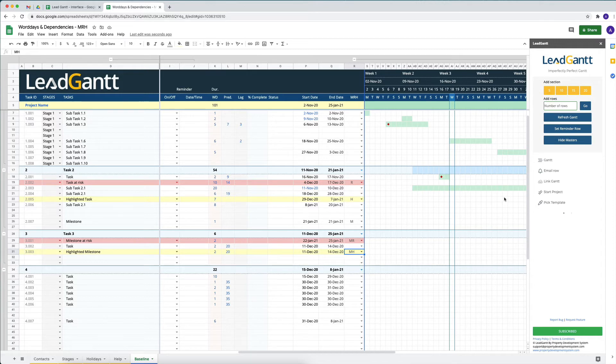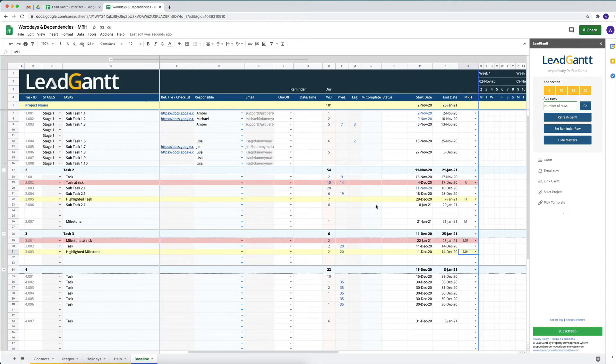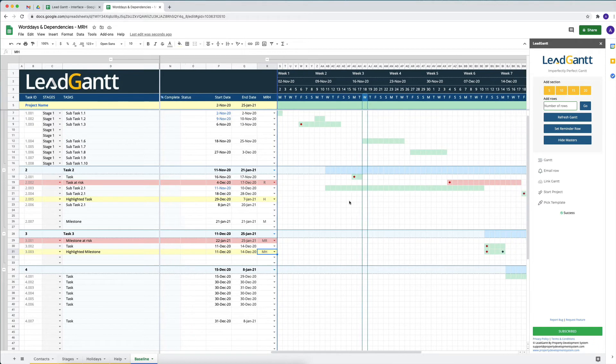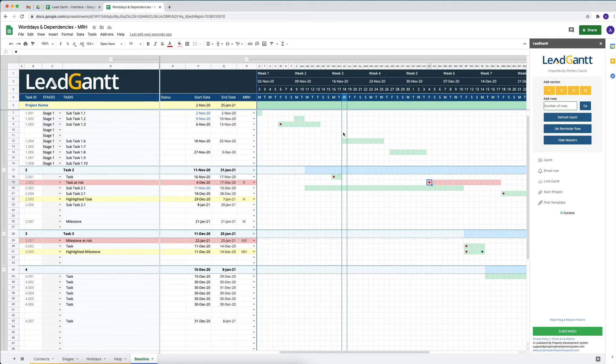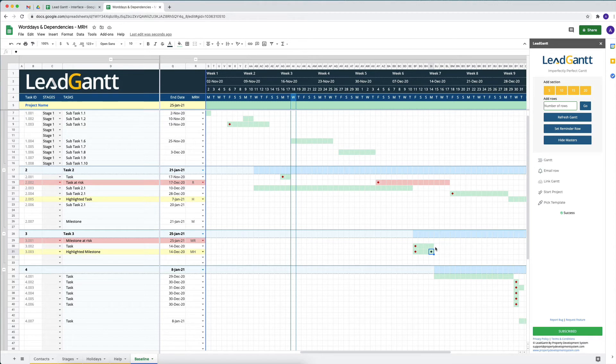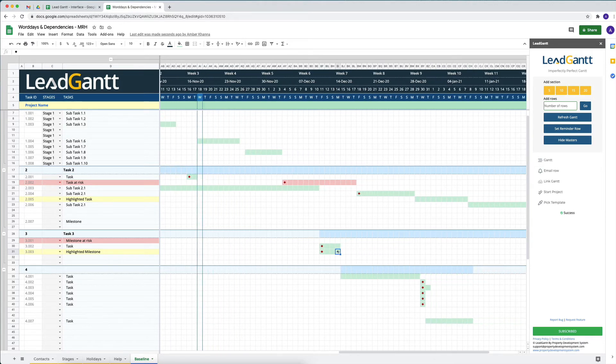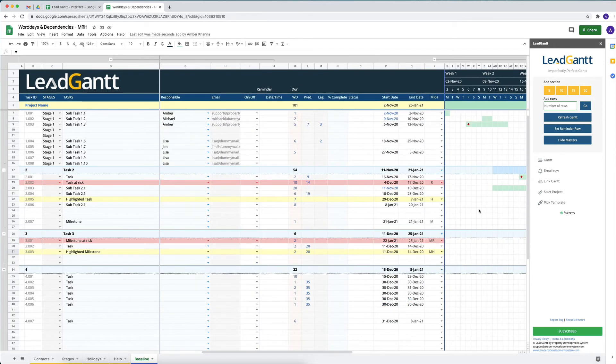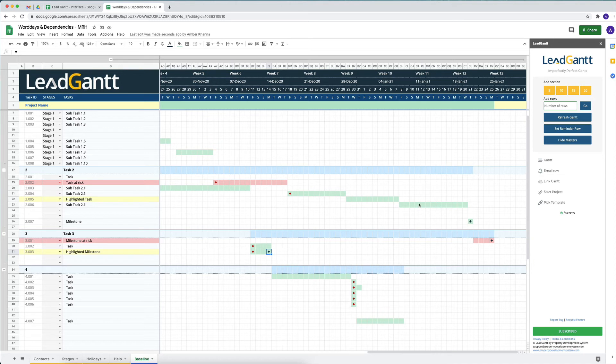Once we've got all these things we can click on our refresh scan and this will then show us what they actually mean on the Gantt side of things. As we know the red dot basically means that it has a predecessor which is not directly right above this thing. The black dot at the end of the Gantt would mean that it is a milestone. So wherever we've got MH or M marked out we will be able to see a black dot at the end of the task.